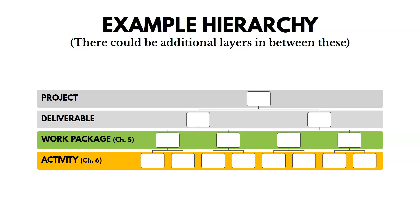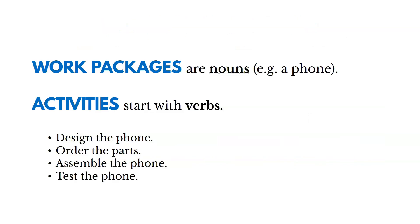In the next chapter, we're going to talk about activities. Work packages are often nouns — like a phone you're creating on a particular project. Activities, on the other hand, often start with verbs: we design the phone, order the parts, assemble it, test it, and so on. Right now in the WBS, we're just talking about work packages; we'll break it out into activities later.